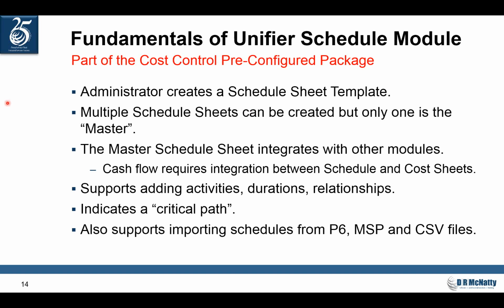This is what's included in the cost control pre-configured package. So the administrator creates the schedule sheet template within Unifier. You can have multiple schedule sheets, but only one is the master. And you do need to be careful here, because once you define a schedule sheet as a master, there's no going back. You can't delete it. You can't change it to another one. The master sheet integrates with other modules within Unifier.